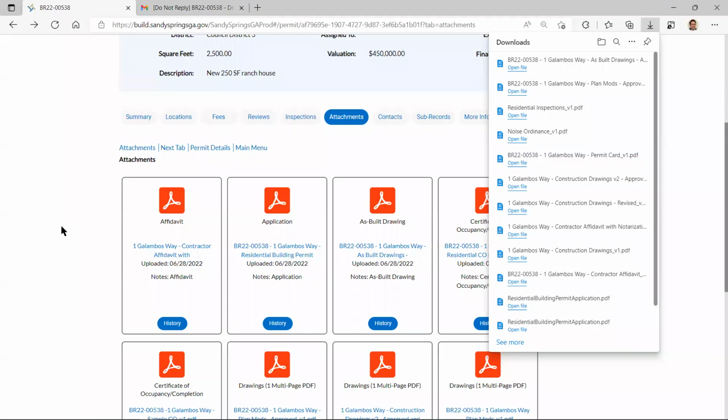All right. So in that instance, everything's done. Let's say the window, for example, in the bathroom. It's supposed to be tempered glass within 5 feet of a walking surface or whatever, the tub. Show me your invoice where you paid for the tempered glass window that's supposed to be arriving whenever it gets there. What I may make you do in the meantime is maybe put that 3M film on the glass or something like that in the meantime till you get the correct one.